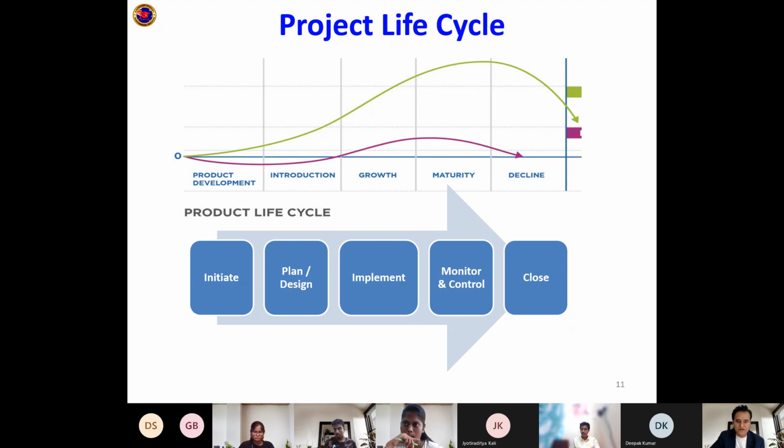So you know exactly which date the project planning stage got over, because the day the sponsors signed off the planning document, which is called the project plan, that date the planning stage got over. The next day you can start implementation. So then you implement.